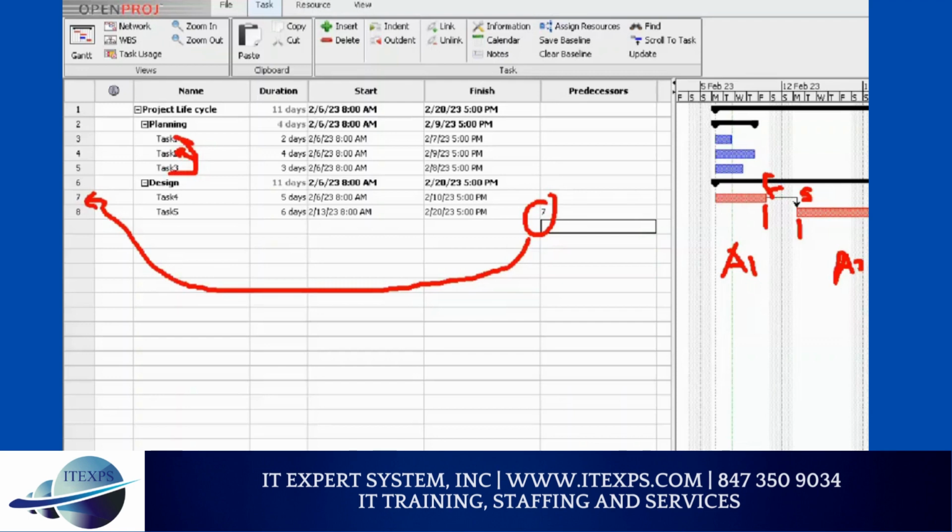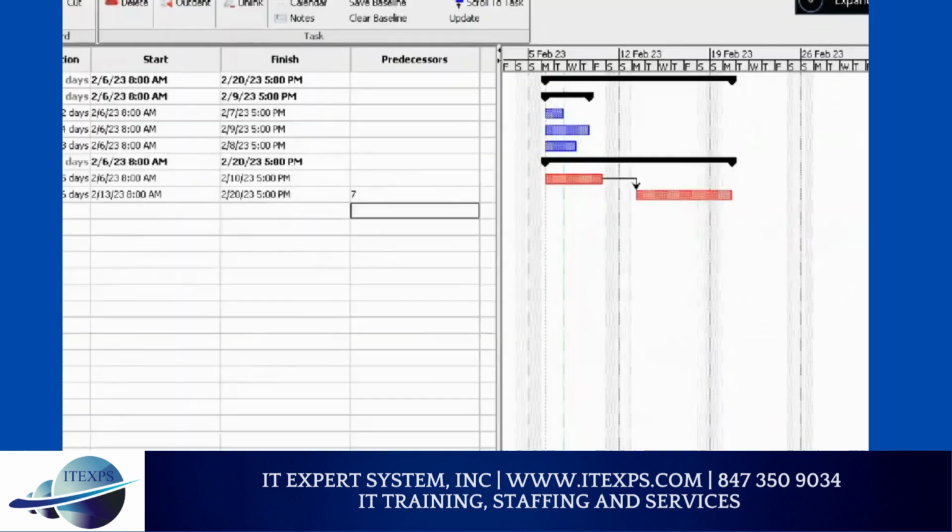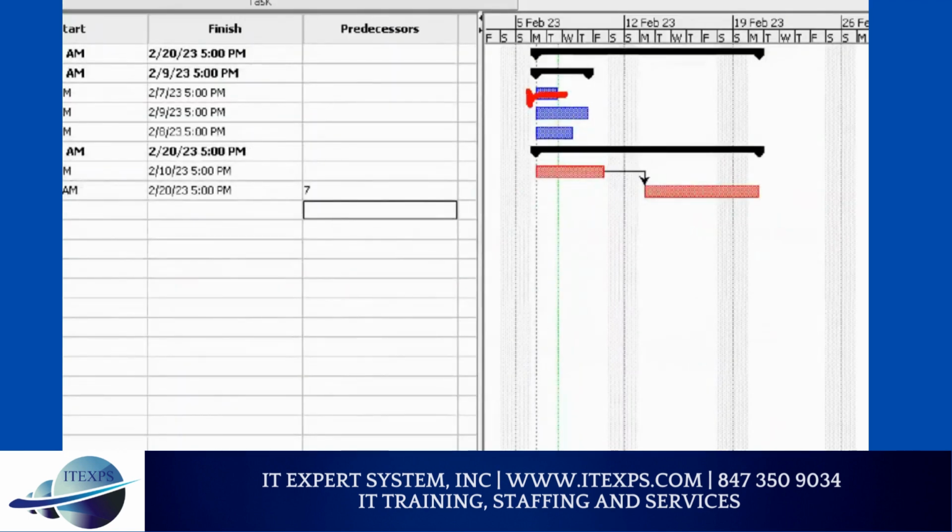Can you repeat what the critical path is again? Critical path means longest duration and shortest path. So this is the longest duration. And shortest path means if I finish this, I can get the project done. But longest duration and shortest path, that's the critical path. So in easy language, if you sum up all the activities, the path whose total sum is the highest sum. So let's say for example 6 days, here 5 days, total 11 days, and that is higher than any of the others available.